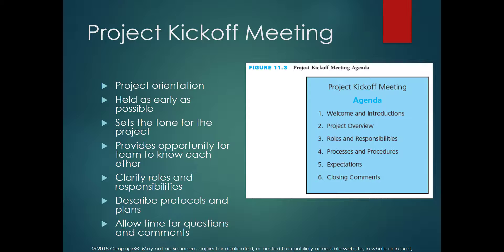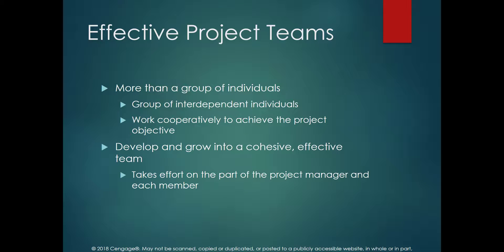The figure on the right side shows example agenda topics for the project kickoff meeting. The six main topics are: welcome and introduction, discussion of project objectives, deadline and schedule, scope of the project, roles and responsibilities, and finally comments where team members can raise questions and clarify any confusion.